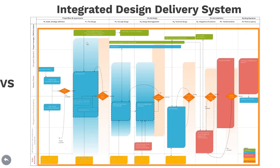However, as the stakeholders are needed from the very beginning of the project, it's very difficult to make the selection with tenders and make good competition between the different actors of the market. And that's why this type of methodology is non-compatible with laws for public markets.